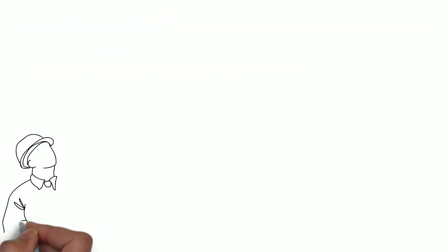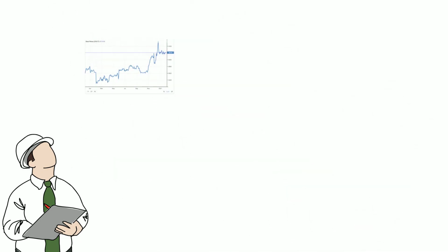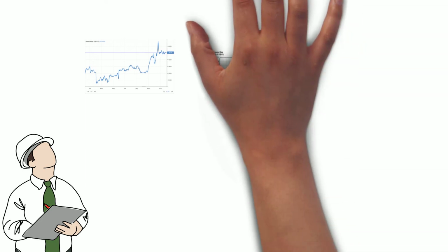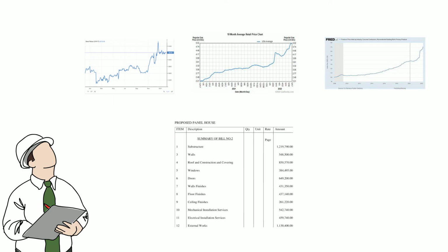So why are we seeing an increase in the use of fluctuation provisions, which have been long forgotten or usually deleted due to stable prices and certainty in the market? Clients are now open to using them, and here's why. As a contractor in 2022, you've seen steel prices increase dramatically. Your fuel has changed from red diesel to white diesel. Aggregate and other raw material prices have increased. So when you put a tender together, your risk pot is significantly higher.